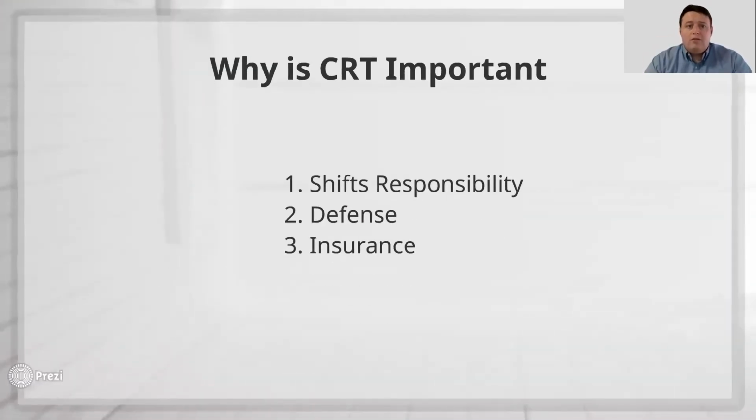So the question is, why is CRT important? Firstly, we just talked about it shifts responsibility onto whoever's in the best position to control whatever is going on. Secondly is defense. Very important to write defense into your contracts because if it's written in there, any defense that comes out of the downstream party's insurance policy will actually be outside the limits of insurance. And if it's not written in there, then it's inside. And what that means is if it's inside the limits of insurance, it erodes any money available to pay a claim.